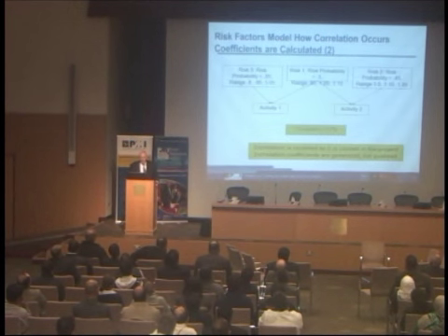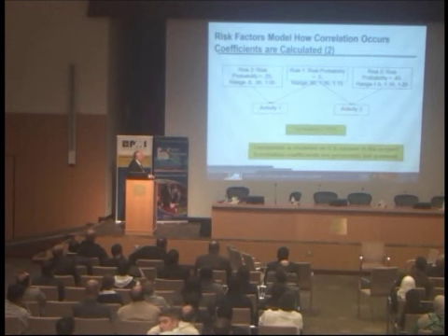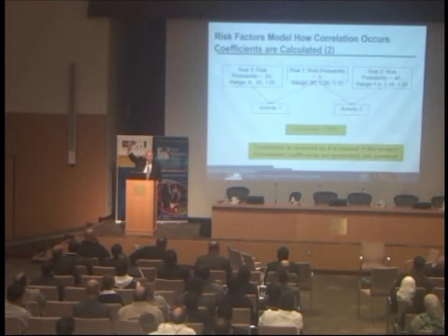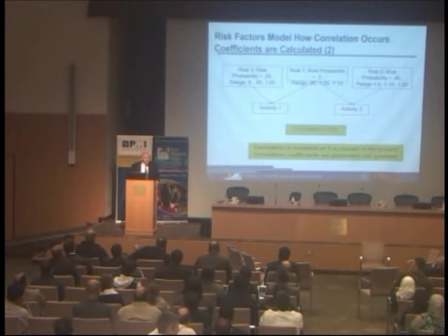That's wonderful. But suppose I've got two other risks. Risk 3 affects activity 1 but not 2. Risk 2 affects activity 2 but not 1. Risk 1 affects them both. So they're still correlated but not entirely. How many of you guessed 37%? How many of you, come on. How many of you guessed 37%? I couldn't either. If I had this kind of a problem, how would I know it's 37%? But I know it's 37% because I ran the simulation 3,000 times, took the results into Excel, and ran the correlation calculator. And by golly, they're correlated 37%.